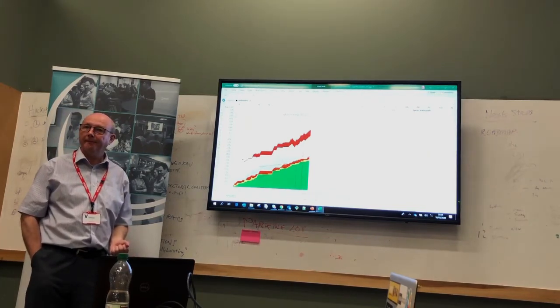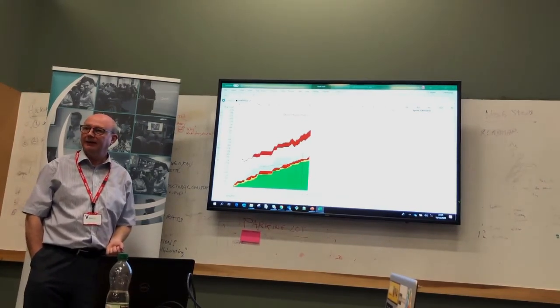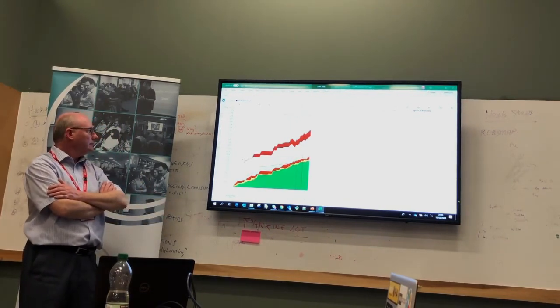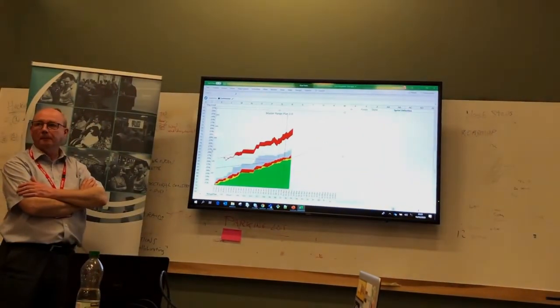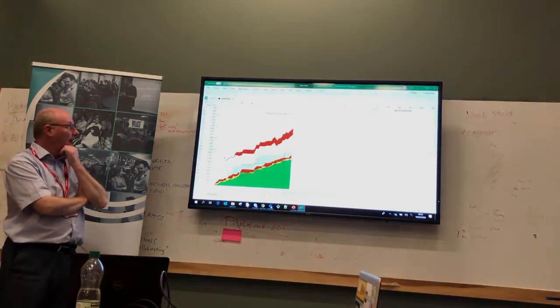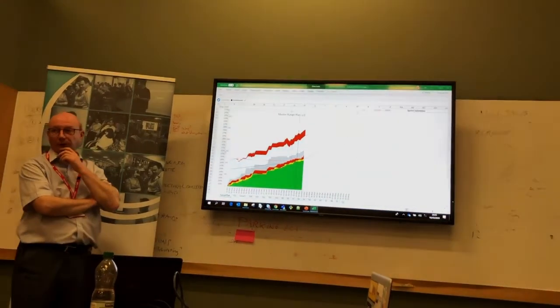Anybody else got another question? Because I've got one. Have you thought about going towards no estimation? I haven't said the word good estimation, but it looks like they're sizing it to be roughly the same size each sprint. So instead of using story points, you could just use the number of stories, and then you'd have a better understanding of cycle time, because it's on average on a story, not on story points.